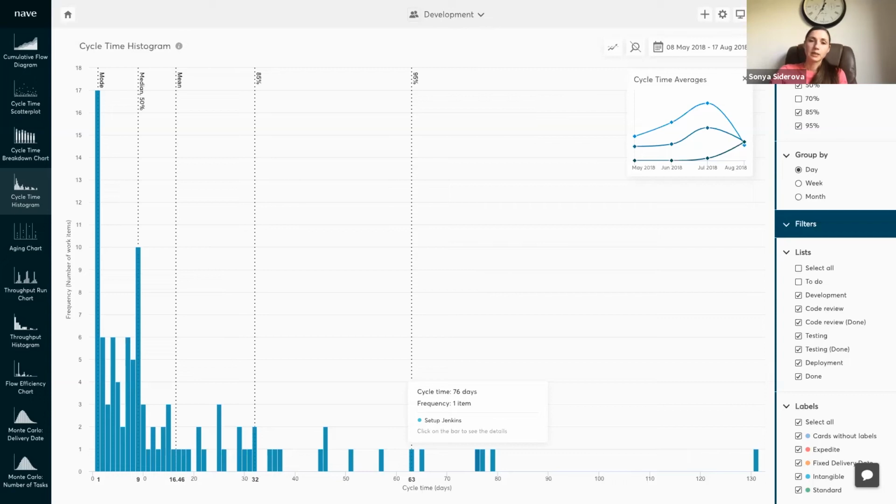Average cycle time is a measure of performance. In this chart, we show the mean, median, and mode average cycle times and how the trends build over time. Ideally, the lines should be close to each other, stay even, or go down. If the values are going up, then you might need to reevaluate your work in progress limits or alter your process policies.